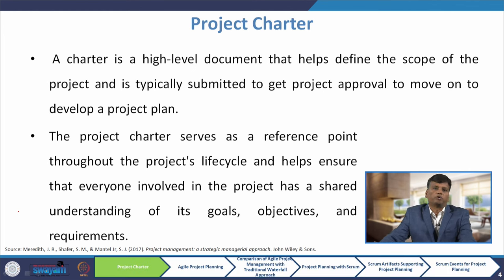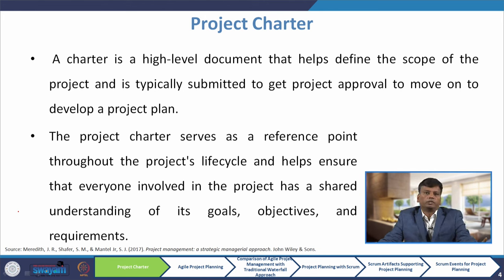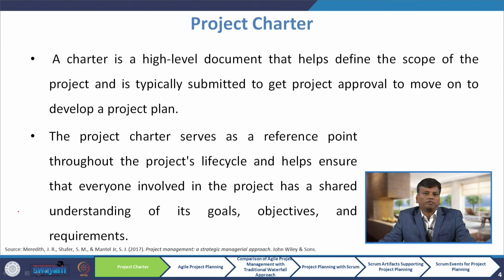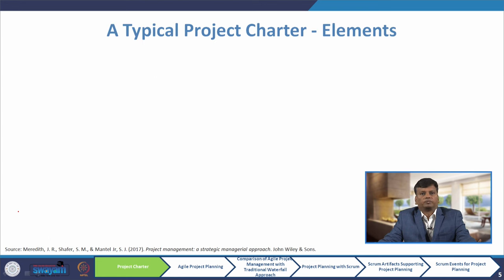First, we will discuss about what is a project charter. A charter is a high-level document that helps define the scope of the project and is typically submitted to get project approval to move on to develop a project plan. The project charter serves as a reference point throughout the project's life cycle and helps ensure that everyone involved in the project has a shared understanding of its goals, objectives, and requirements.